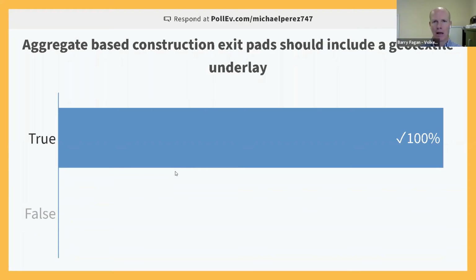As Mike talked about costs earlier and pointed out about a $3,000 installation for that ALDOT typical, know that that only covers the initial installation. So if you're putting together an estimate for your project, you're going to have to include some work to refresh that rock, not just to loosen it up, which is one way to refresh it, but also to add some clean aggregate later on. So there needs to be cost included with that. And so the filter separation geotextile can actually help save you some money or reduce the amount of maintenance and cost associated with that.